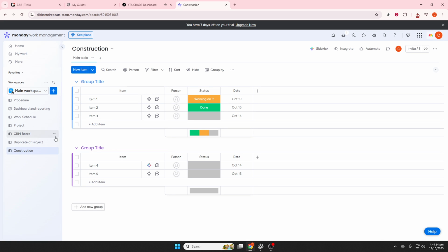Then let's dive into making the most of Monday.com's views, like Timeline, Gantt, or Calendar. These visual tools are essential for tracking your project's progress. To enhance their functionality, use task dependencies to adjust timelines dynamically when changes occur. This adaptability is crucial for managing a construction schedule where delays and changes are inevitable.